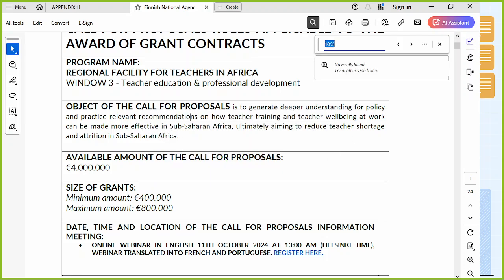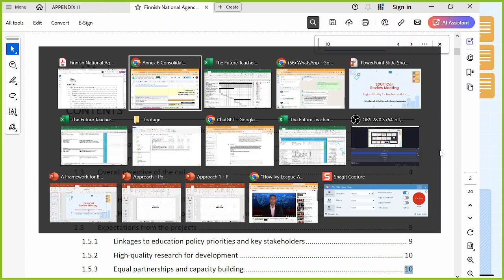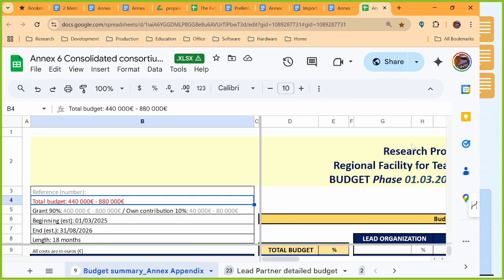Yeah, that's significant, because they indicated it there in that budget, Martin. Yeah, that's always a requirement. It's very true. So, Gatune, from a budgetary point of view, that's very significant. It is, because you have to reflect it in the budget, isn't it? The 10% contribution of Maastricht. It's something we cannot lose oversight of. Of everyone, not only of Maastricht, of everyone.